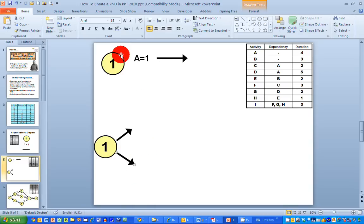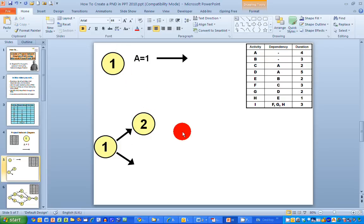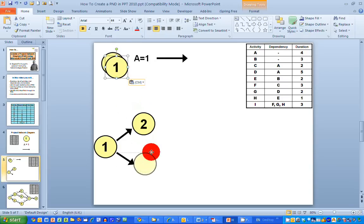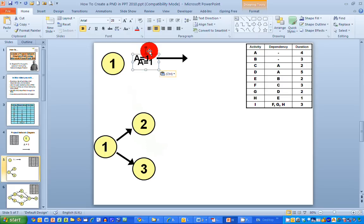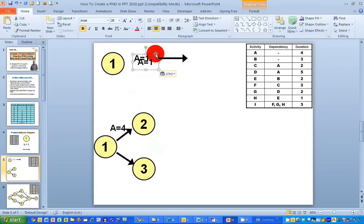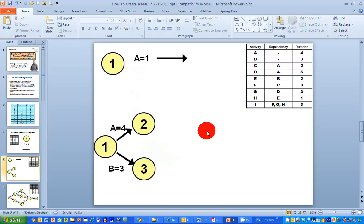Every activity has a start and an end node, so I'm putting in an end node for activity A — I'll call it node number two — and an end node for activity B — node number three. Each activity must have a name and a duration: activity A has a duration of four days, and activity B has a duration of three days, so B equals three. I've now got my first two activities drawn on my project network diagram.